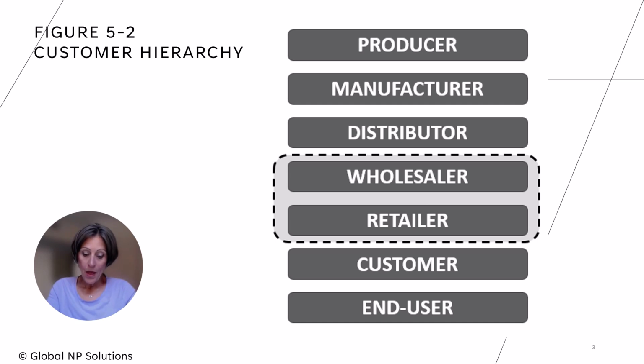Financial risk. When a company has low financial risk for NPD projects, it is a good candidate for a waterfall process. Work can largely be defined upfront, and it is easy to generate a rigorous plan, budget, and schedule to execute the project. Additionally, the piecemeal investment strategy of funding NPD projects by stage is ideal for incremental innovation projects. Often firms have lower financial risk due to favorable brand or category recognition. In other instances, financial risk is low because a new product is self-funded by prior generation sales.